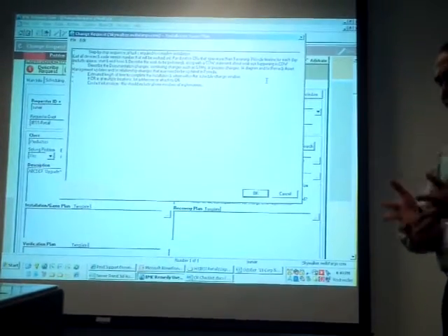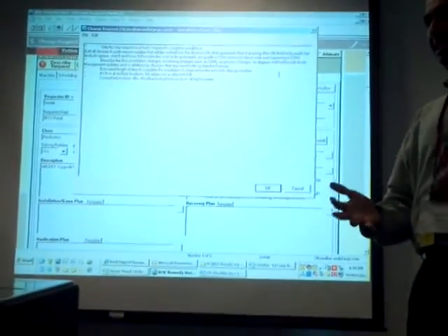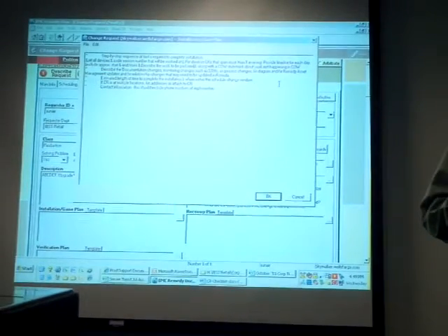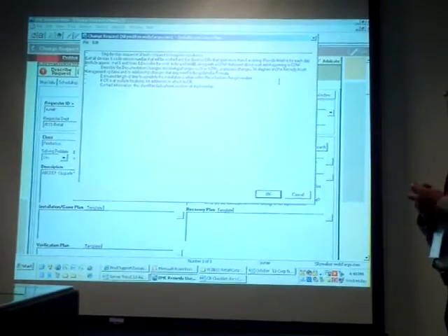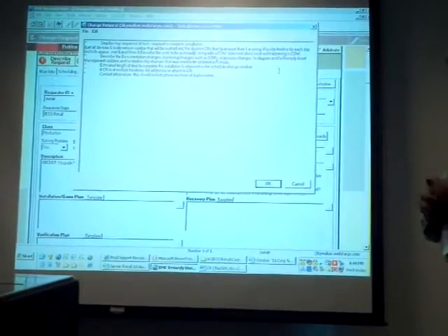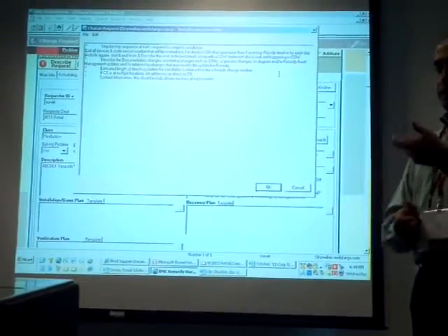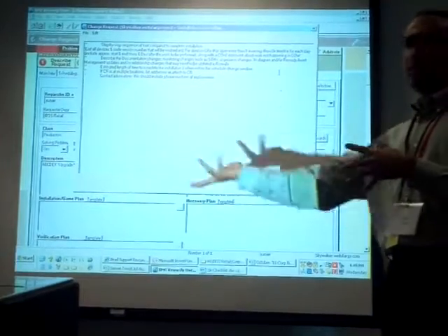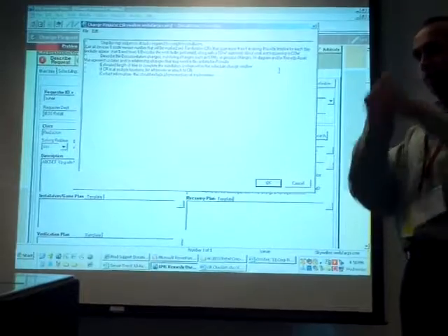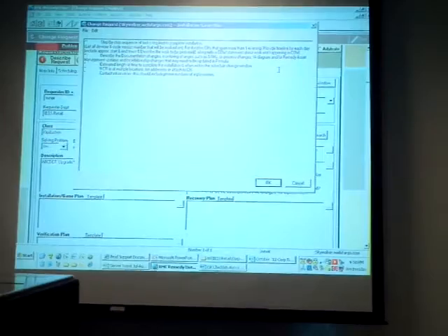Someone says OVO, which version did he install? Did he install 8.6, 8.7, OVO 11? Don't leave room for ambiguity. Be detailed there. If you are making a change to an operating system parameter, make sure you document it in there. The system was 4 gigs, change it to 8 gigs. It was sitting on C drive, you pointed it to D drive or kept it. So later on, let's say a month from now, if someone opens up that CR tied to the asset, they know exactly what you've done. Right?